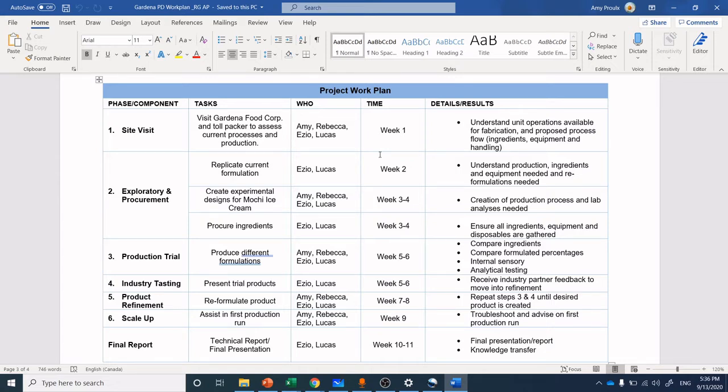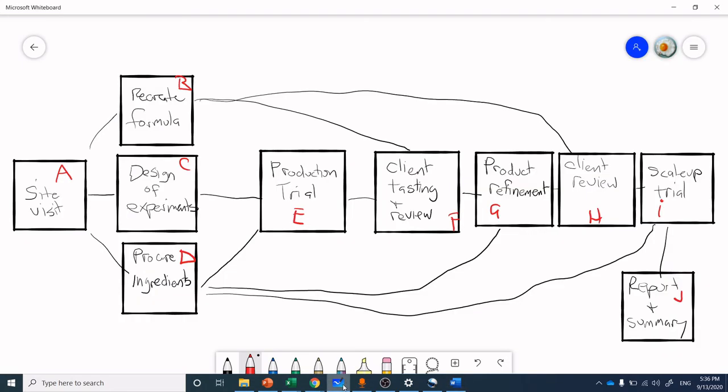These are the sorts of questions that you start to ask at this level. You want to go through each of those tasks and think about what's the bare minimum time necessary for absolute optimistic time frame. What's a realistic time frame? And then what's a pessimistic time frame on each of these different tasks. From there, we're going to draw it out in a sketch into a bit of a flow chart. I actually did this on my screen whiteboard, and I have a Wacom board so I could scribble on the board.